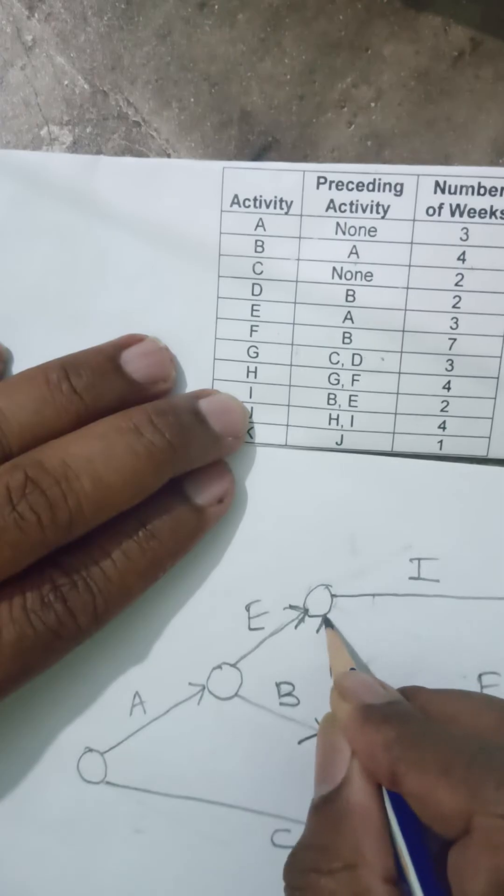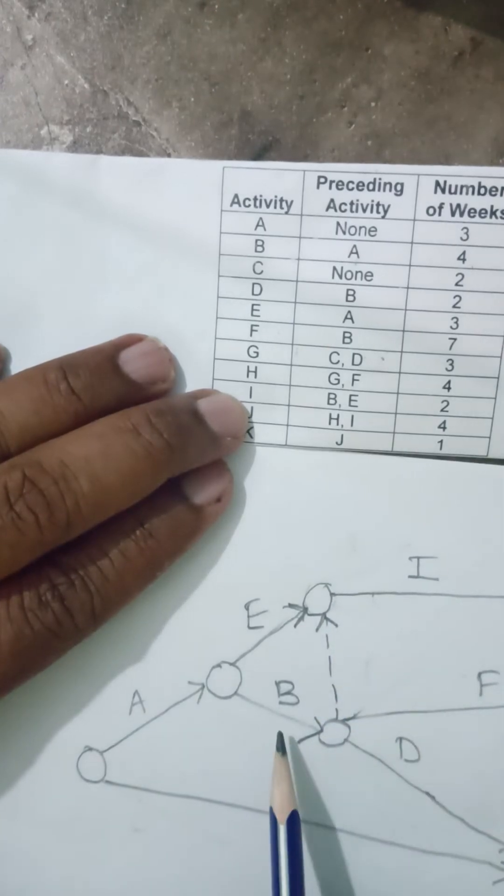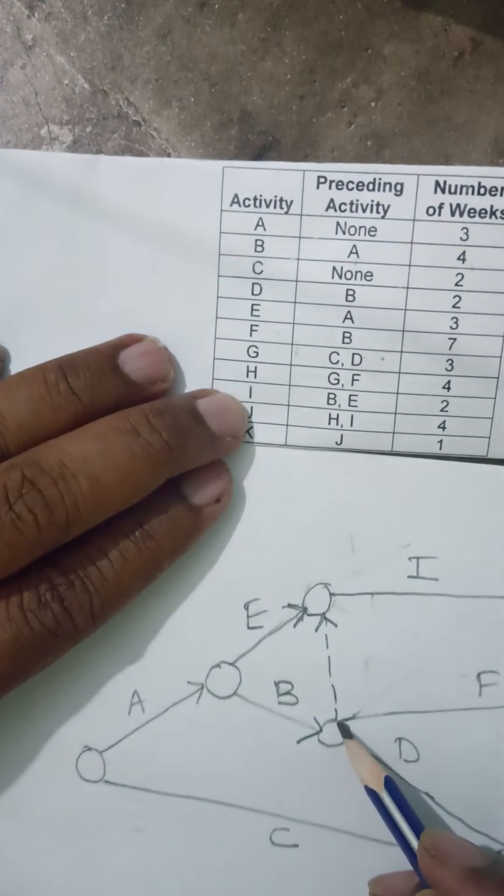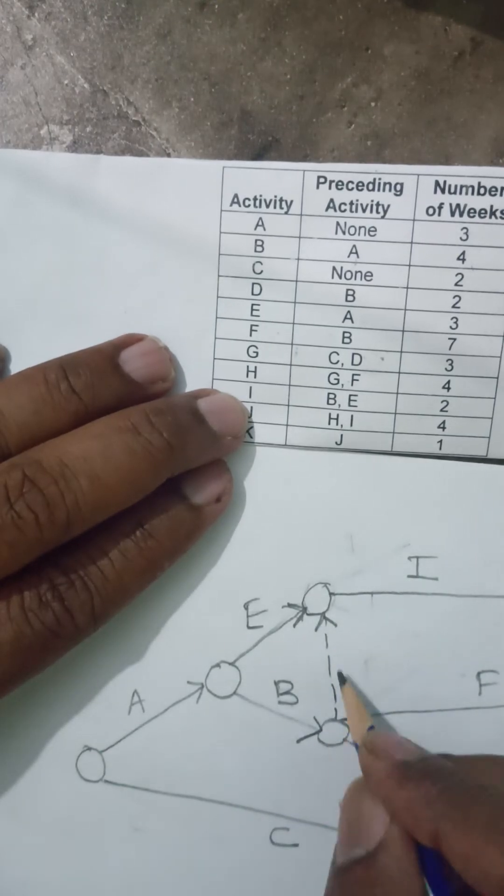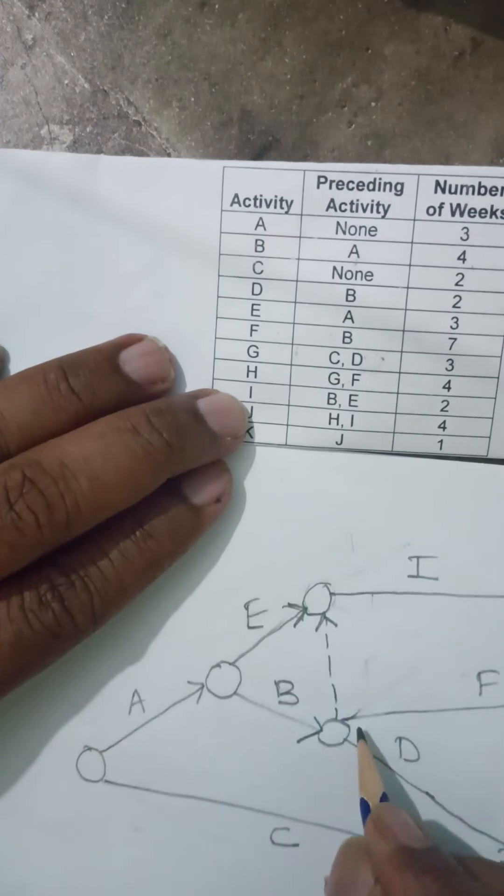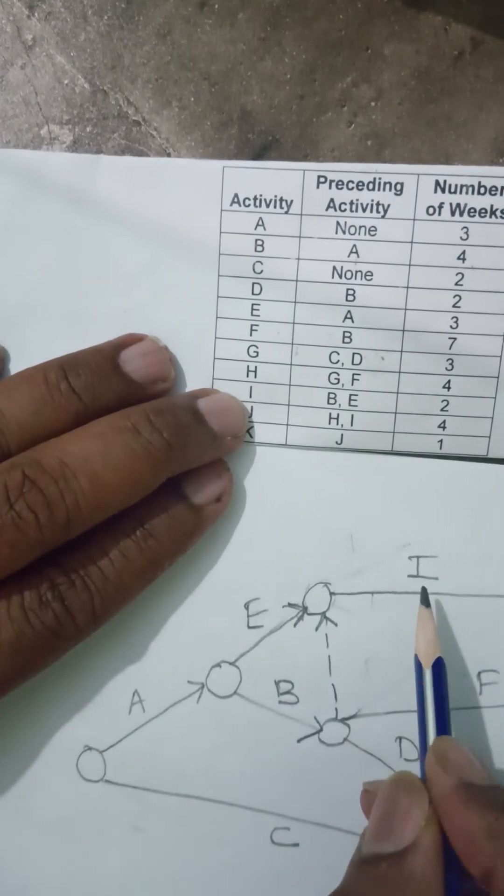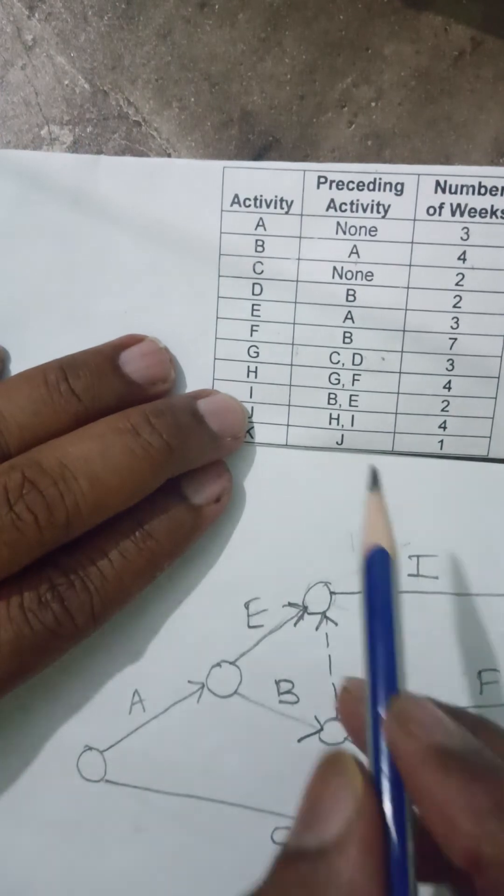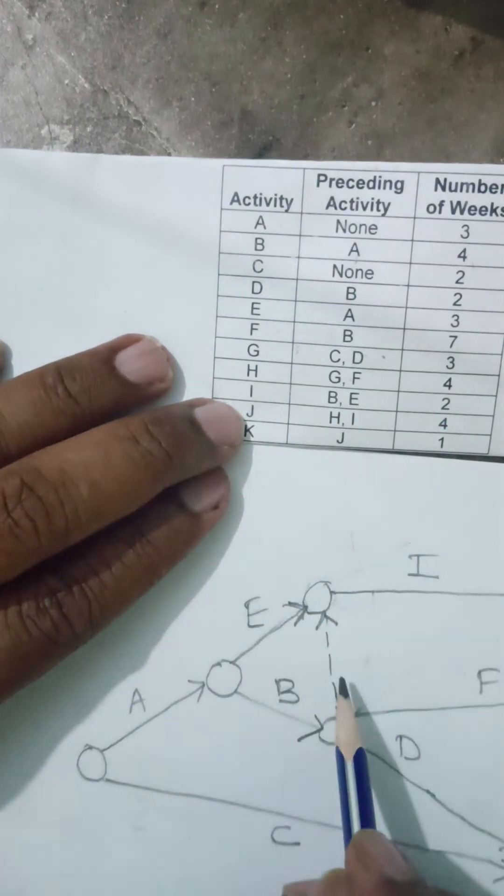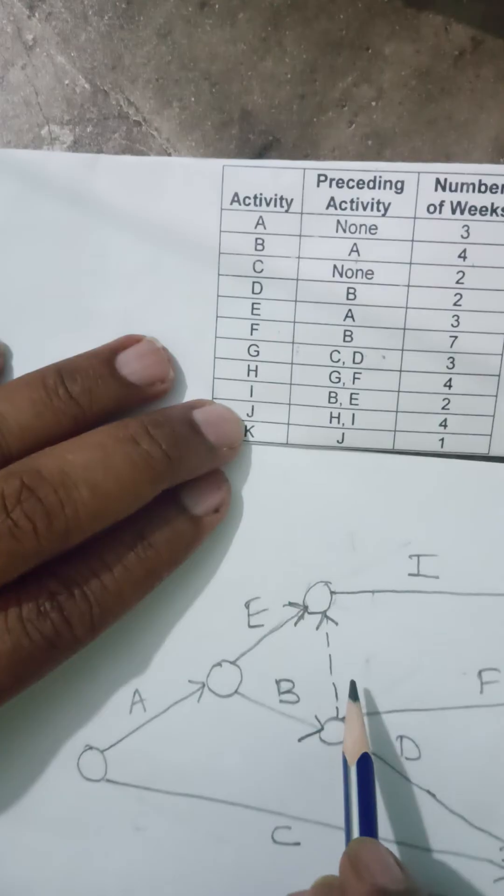For B and E both, I will show a dummy activity. Because there is no other way I can connect I and B. I cannot start from here because then E will remain separate. Now this dummy activity is a must here because I requires E and B to finish. This is how the dummy activity comes into existence.